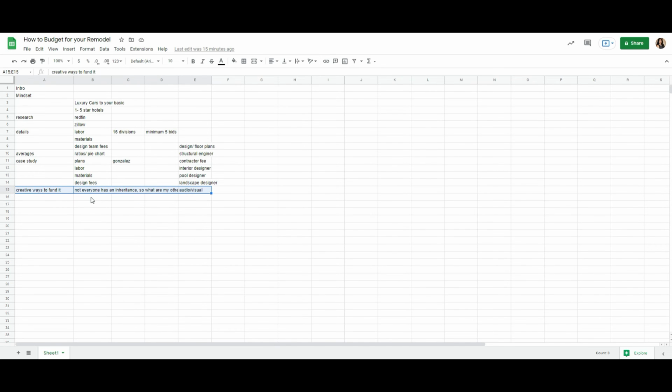And once you engage in a project, it's not like you have to pay for all of it up front. Usually if a project takes 12 months, it's never the case that you pay for everything up front. It's usually a retainer, and then, at least for the design portion, some projects we pay 50% up front, 50% at the end. If it's a very detailed project that's actually going to take 12 months, then we'll do 25% every quarter of the fee. And then, of course, once construction starts,